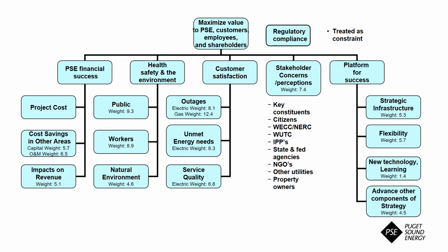The weightings for each benefit and cost are determined by comparing the willingness to trade off various levels of performance. Each project benefit and cost is converted into dollars using these weightings, and an overall net present value for the project is calculated. A higher weight corresponds to a greater impact to the net present value for that benefit or cost. This process allows projects with very different benefits to be compared.